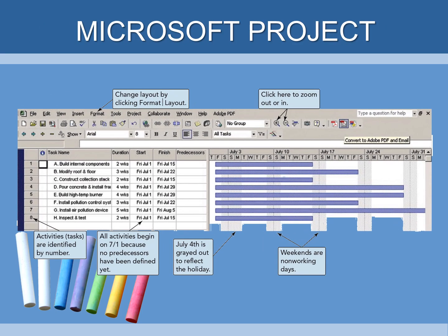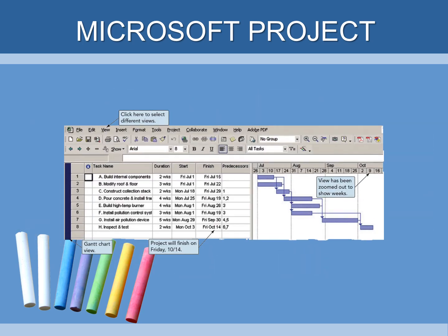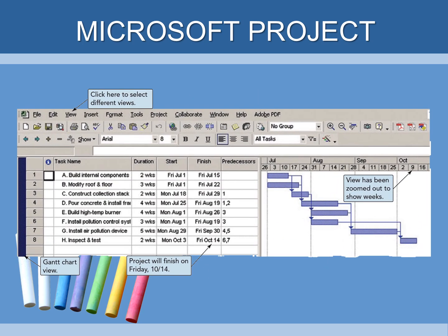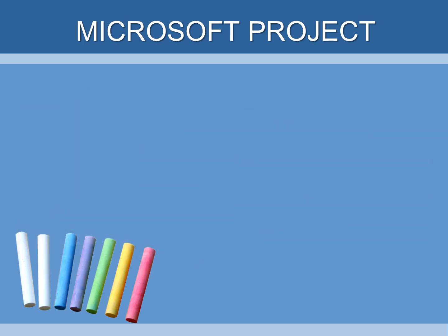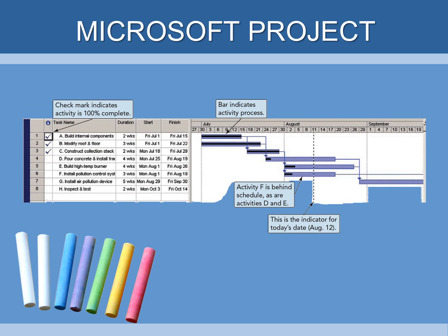Microsoft Project looks like this, much like a Gantt chart. And the thing that I liked about it was you can set this up to color code, and these bars will show up green, yellow, or red. Green if you're on time, yellow if you're starting to run behind, and red if it is behind. And you can visually see where everything is a go. And you can see there it has the steps, the dates, the start date, the finish date, and how they overlap.